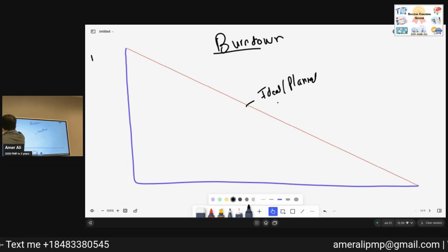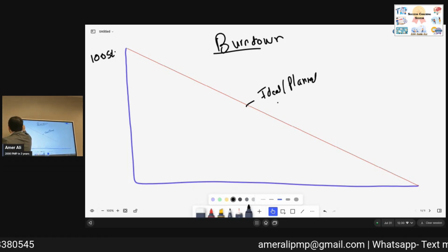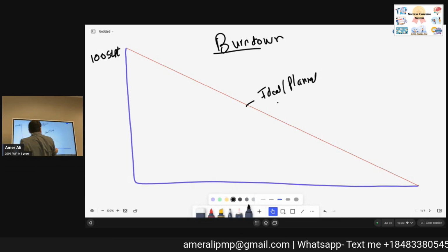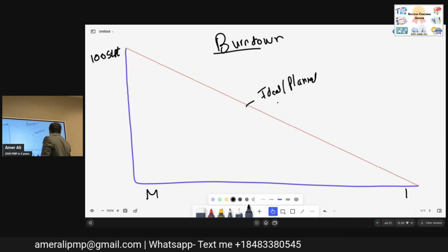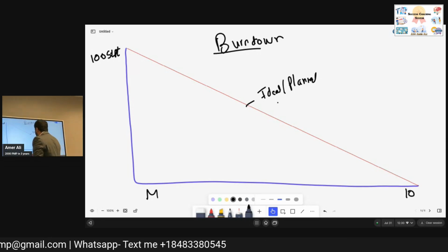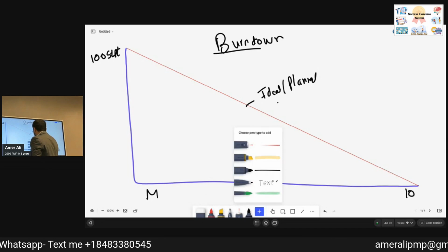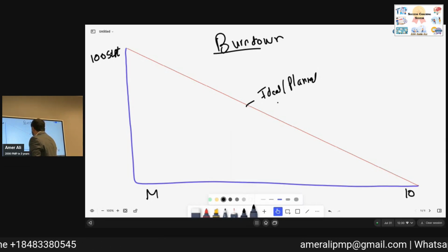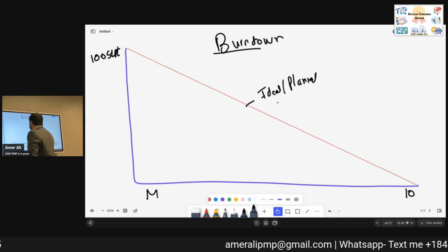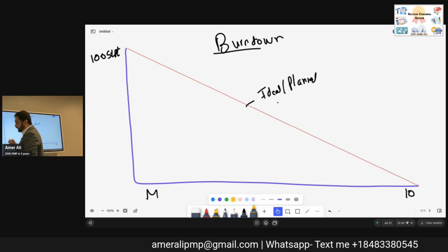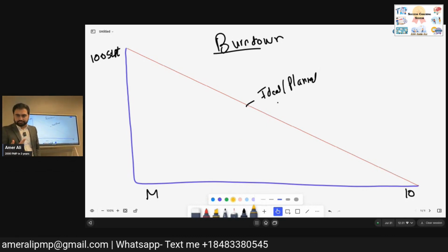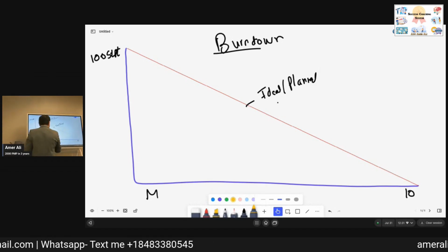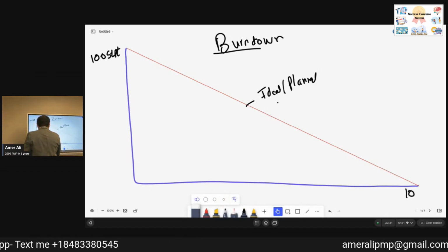Here it is story points, let's say 100 story points. It can be user stories. It is Monday, Tuesday, etc. 2 weeks, 10 days or 14 days. Now, as we progress, we are going to plot the actual burn down chart. RACI comes in agile. Yes, RACI also comes in agile. Okay.